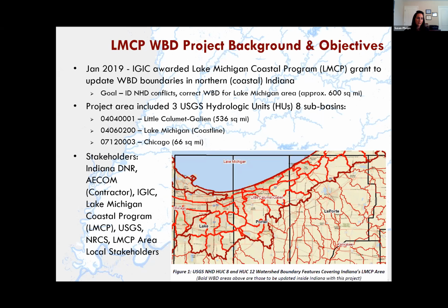And so Indiana DNR had also been performing some WBD updates in some other basins as well. Their scope was pretty similar to ours, except they were not processing the newer LiDAR for those efforts. They were actually working over here in the Kankakee Basin, which is adjacent to where we were working. So we did make sure that we were edge matching and coordinating with them, making sure that data all lined up with what they had as well.